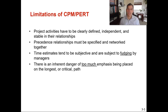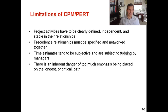Some of the limitations of CPM and PERT: project activities have to be clearly defined, independent, and stable in their relationships. If you're wrong on your estimate for one of those activities, your entire project estimate is wrong as well. So all of the activities have to have really good time and cost estimates, otherwise it's going to be inaccurate. The precedence relationships must also be specified and networked together — you've got to know what is step one, step two, step three, step four. And when you're talking about enormous projects, it's not always straightforward about what steps have to be taken to get to the end goal.